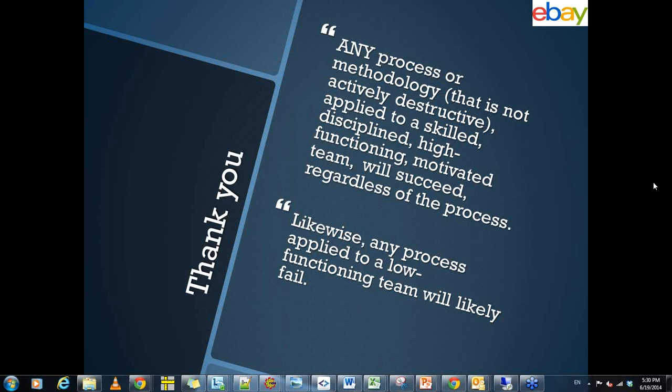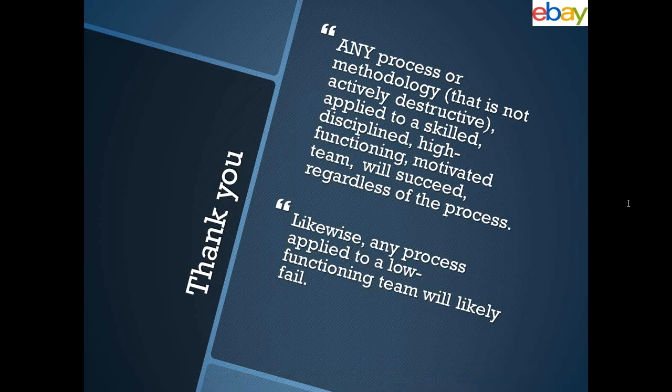Okay, so this is the next question. Can we get statistics from the Kanban board? Yes. So what you can get is the average cycle time. It will be different from the Scrum statistics, but what we usually measure is the cycle time of when a task moves from the start to the end.